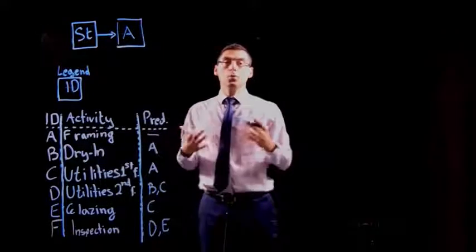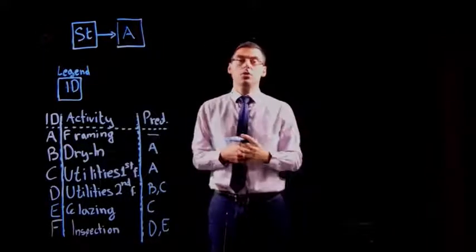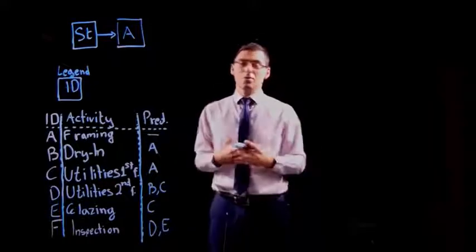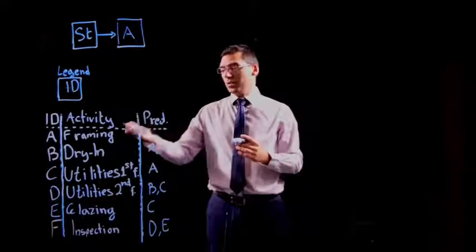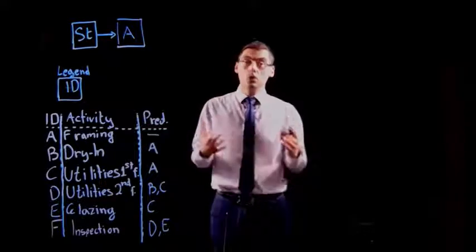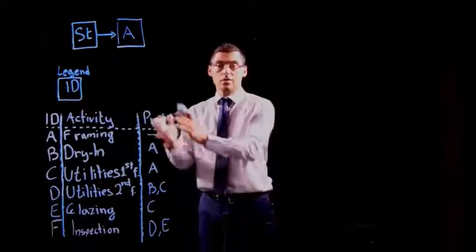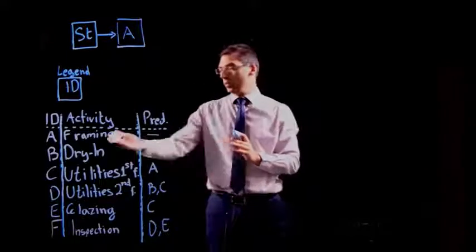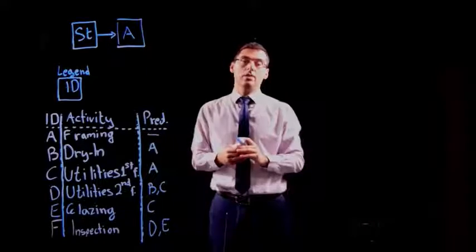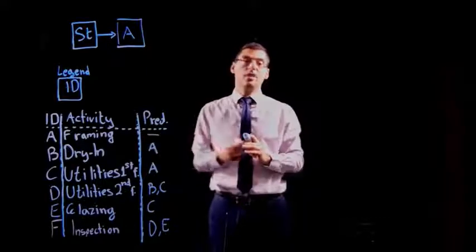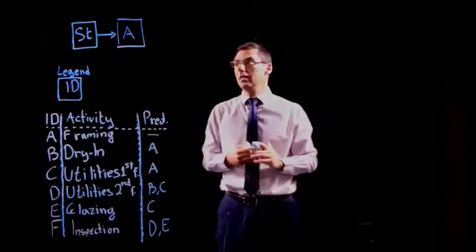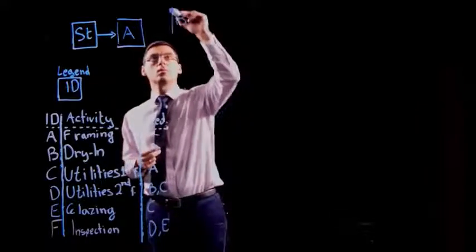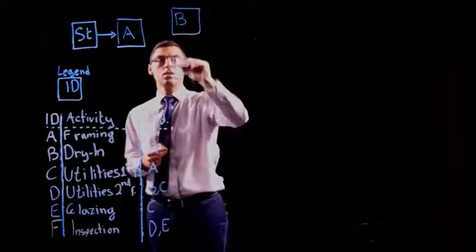Now, after you put all the activities that have no predecessors, you have to pick, the algorithm says at random, but I bet that you're going to be cleverer than that and you're going to pick the next activity and make sure that all the predecessors of the activities that you're going to pick have already been placed in the network. That would be the case for activity B and activity C, because both of them have as a single predecessor activity A. So there you go. That's activity B. That's activity C.